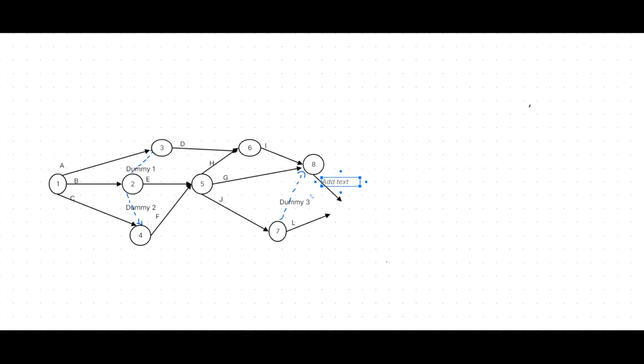we need to complete K and L to start M. We start K and L from different events. Then we can complete all within another event.